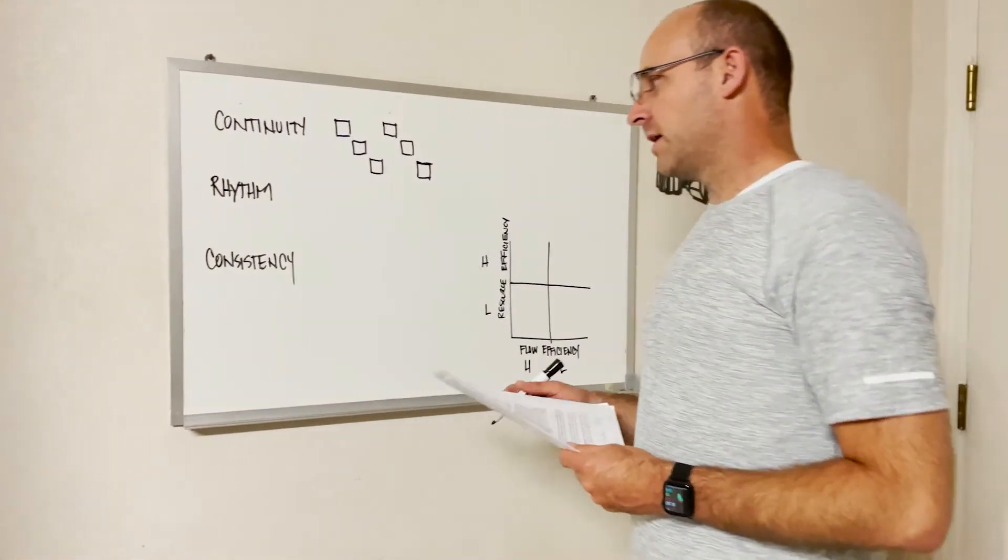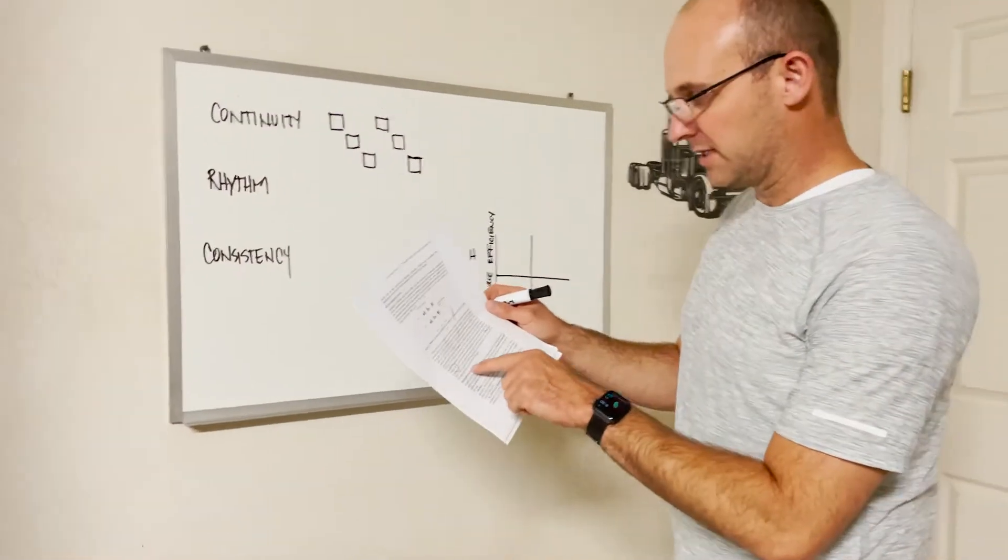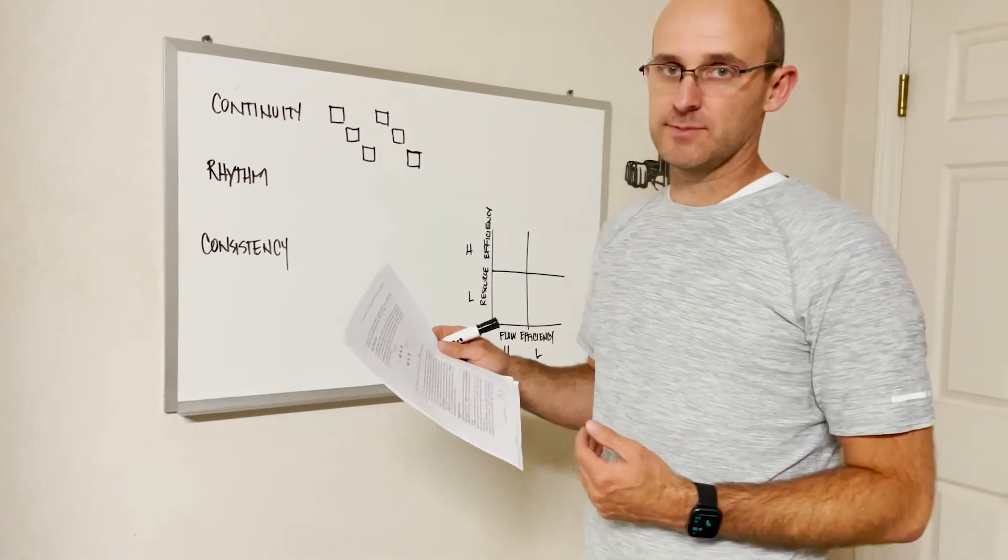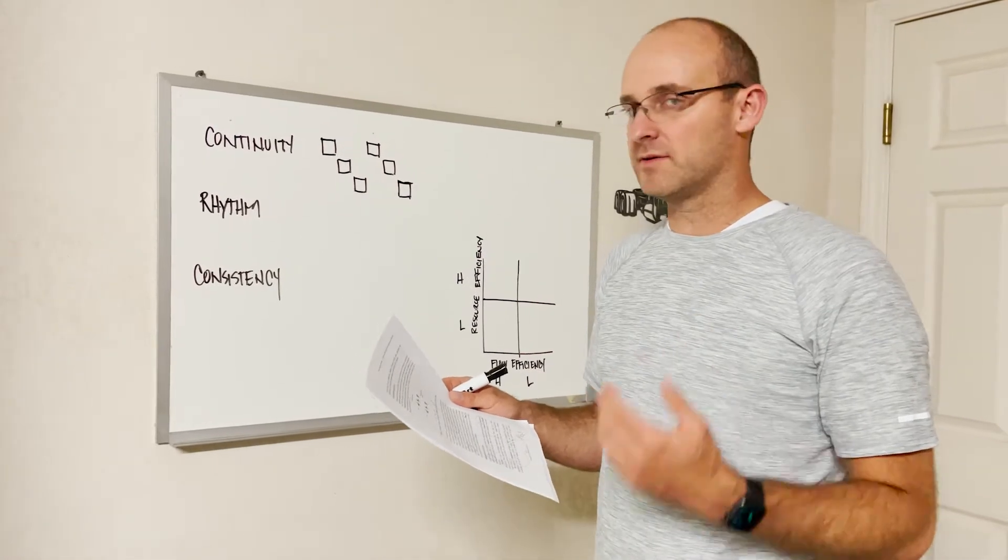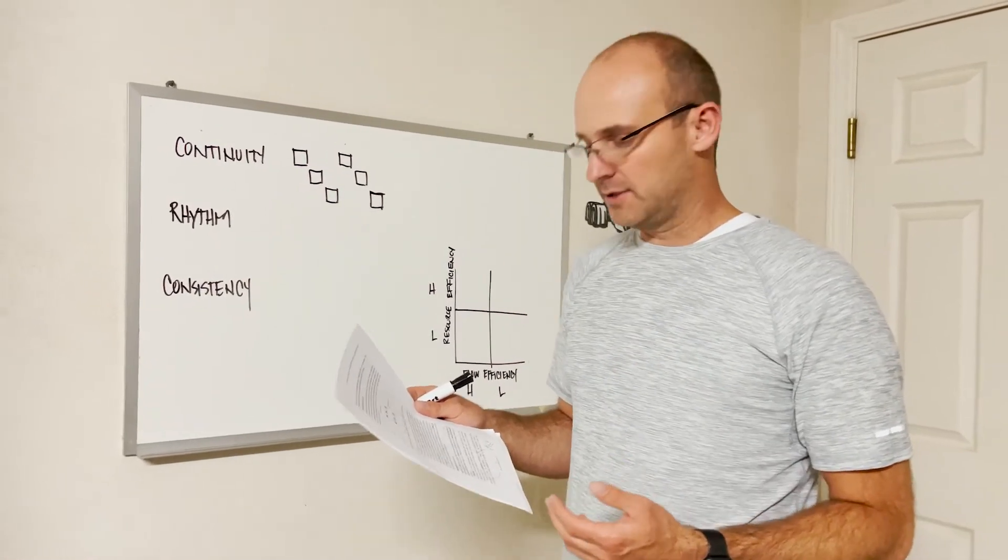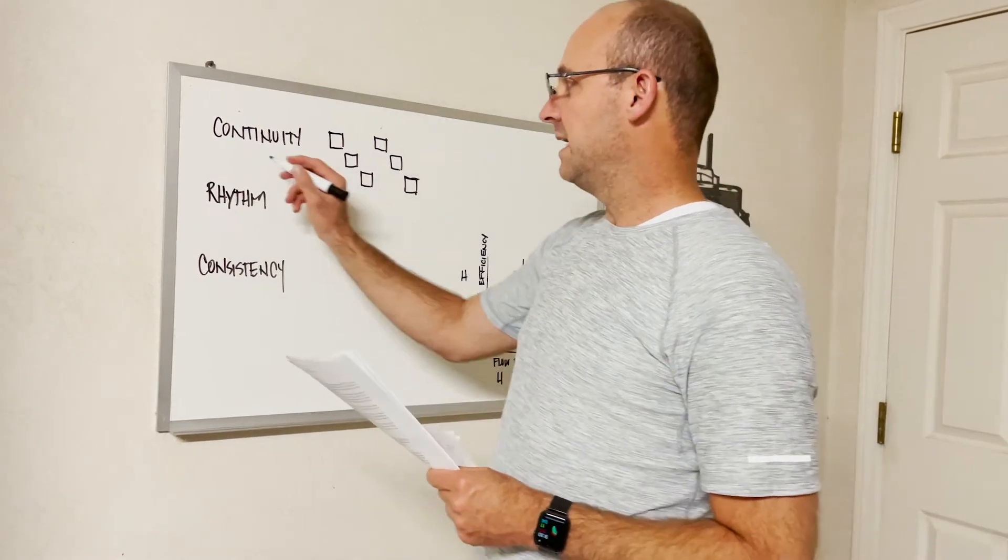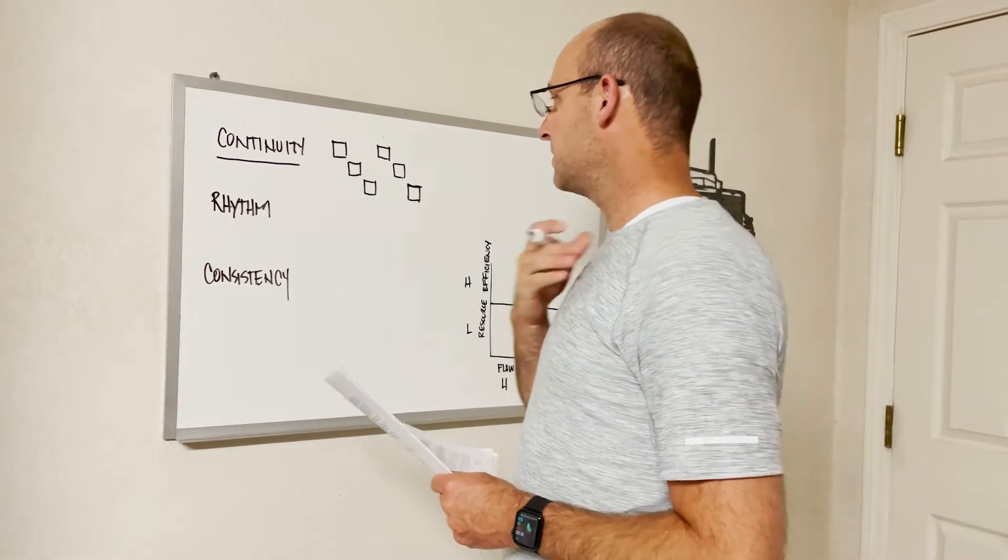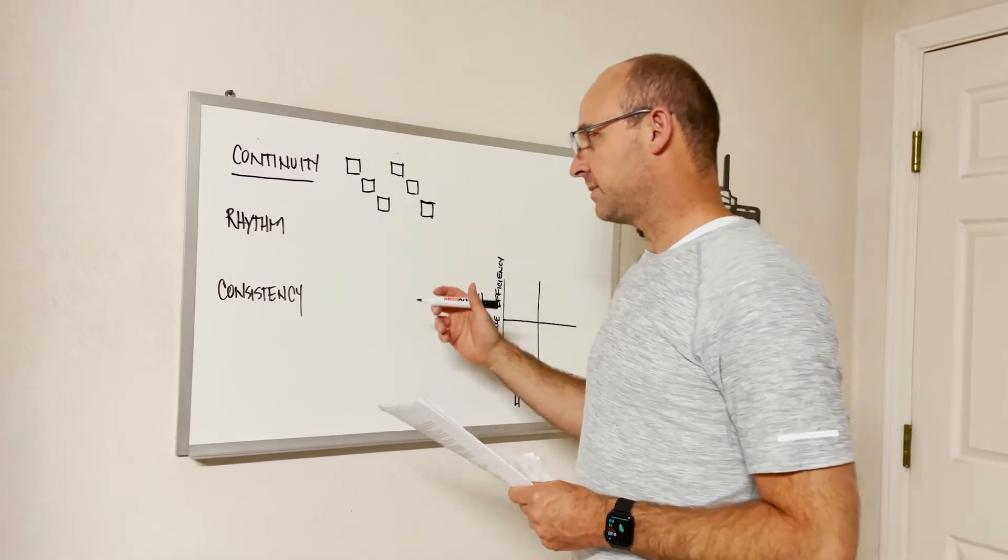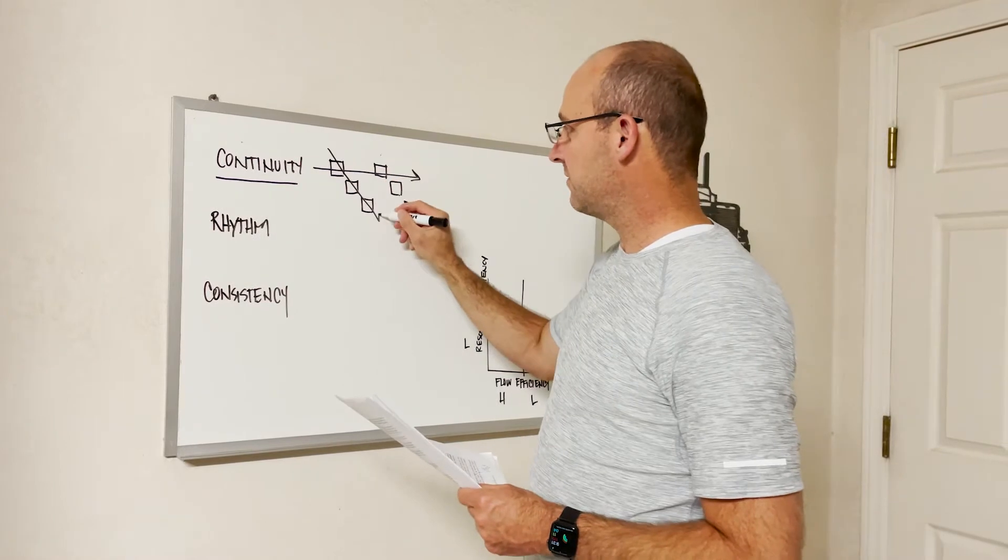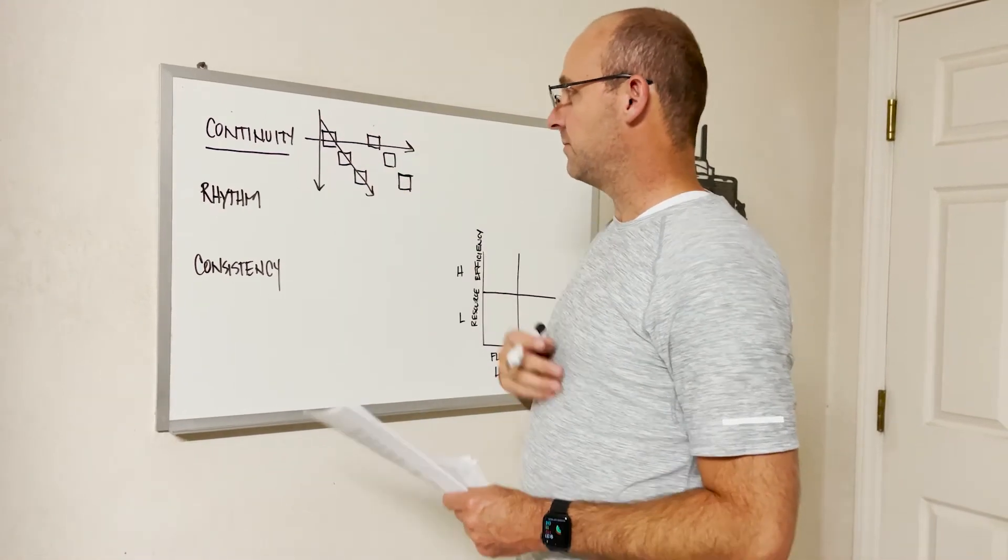So there was a really neat part in here that said properties of flow. And so I researched these as a part of the tact planning book and all of the trainings that we do. And there's three key things that are key for flow. One is continuity. So we talked about how in a tact plan you can see workflow, trade flow, and logistical flow.